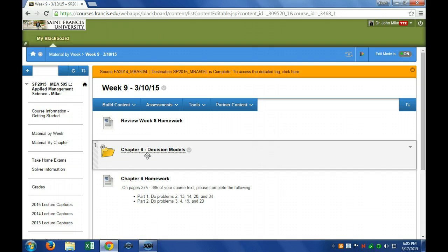So what this is doing is saying, give 1/6 of the weight to the best case, 2/3 or 4/6 of the weight to the most likely case, and 1/6 of the weight to this one. So for every activity, that's what's happening. It's determining an average that way. The standard deviation recognizes the spread. It says take the worst case minus the best case divided by 6.